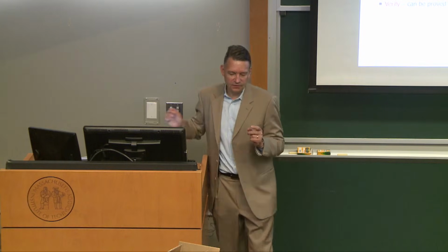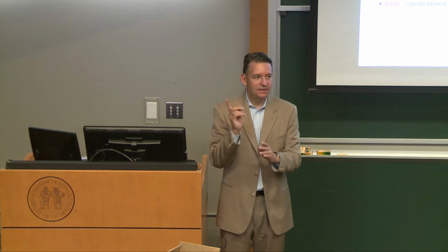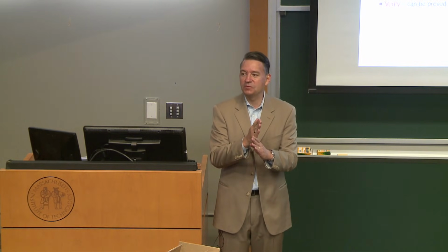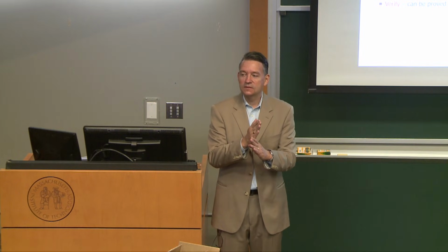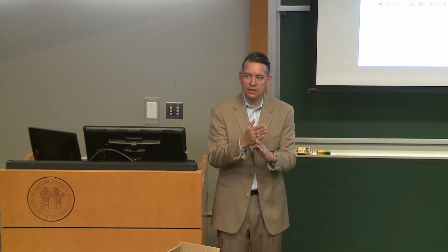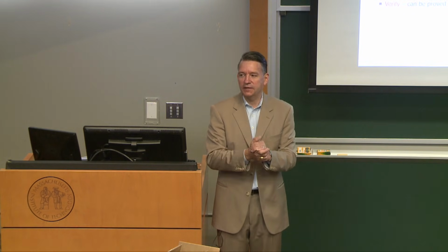That's right, and we'll talk about this a little bit. But if all of them are shall statements, they're all hard constraints. The objective space that I showed you may in fact have zero feasible space, right? So really knowing what is a hard constraint, what is a hard requirement, and what's flexible, that's very tricky,